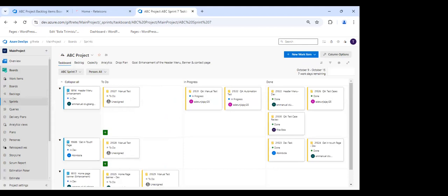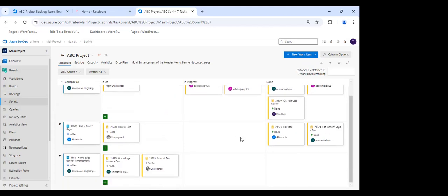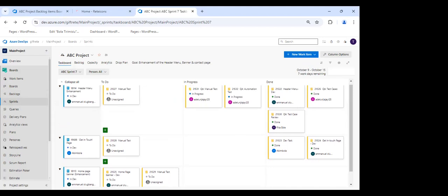Because one person needs to develop it, another person needs to probably review it, another person needs to test it, another person might even need to review that testing also. Then at the end, there'll still be a UAT too. So different people might need to create different tasks for that particular story. That's why they went to this board that you're showing now to discuss what and what.